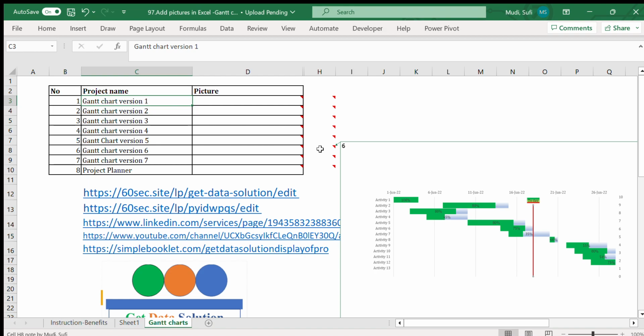In this particular case, for example, from the line, that's the red line, activities to the left side are actually expected to be finalized, especially activity 1, 2, 3, 4, 5, and 6 should be completed on that particular date. But from the graph, it shows that some of them are 80%, some of them are 45% and 100%. So this is another type of Gantt chart you can use to track your project.